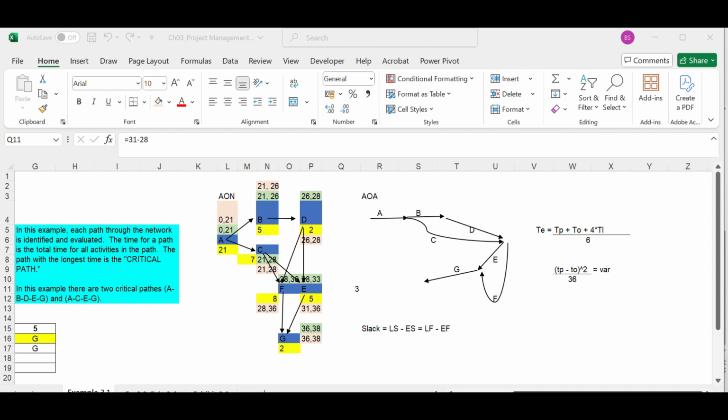Any time delay on the path of a project has an irreversible recovery. It also has a cascading effect on other factors like budget and resourcing. A delay caused in a project might result in a scarcity of resources or a scarcity of funds. The activities might become costly because of a delay incurred in one task, because the market always changes, economics changes. Therefore, we can have a time overrun, budget overrun, or an unavailability of resources, etc.